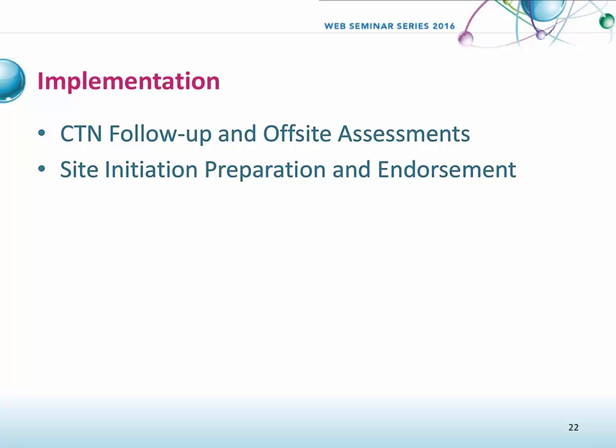We also, the second document that we have there is something that the CCC developed, specifically a comprehensive checklist for site initiation. So that is a big part of that section where in the beginning of every trial, the sites are given a checklist that really is very comprehensive and detailed and gives information on everything that is expected from the site for the purposes of endorsement. So what regulatory documents do they need to have? What supplies have to be on site? Who are the personnel involved, the staff involved? Are their trainings complete? Is all the equipment necessary in place? Have all the SOPs been completed and reviewed?